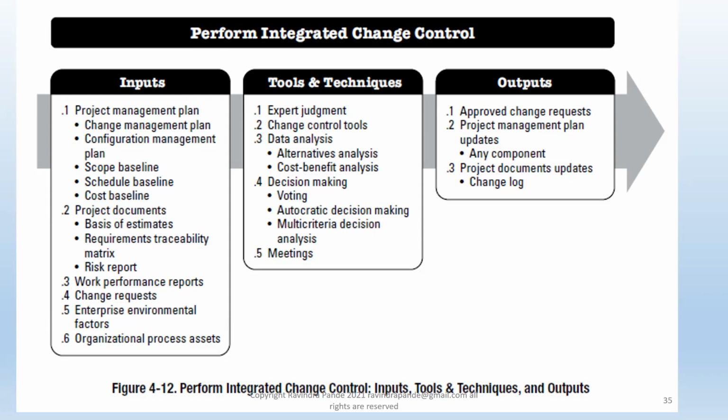And then the project document update is the change log, and this change log talks about accepted changes, approved changes and accepted by the project manager. These two are different processes. Please pay your attention here. When it comes to the change log, it considers all the changes which have been reported by the client, but when they are approved, they get mentioned as approved with a timestamp. And when they are accepted by the project manager, then they are called accepted changes. So there are three statuses to each and every change: mentioned or noted, reviewed, sanctioned, approved, and then accepted in the project plan.